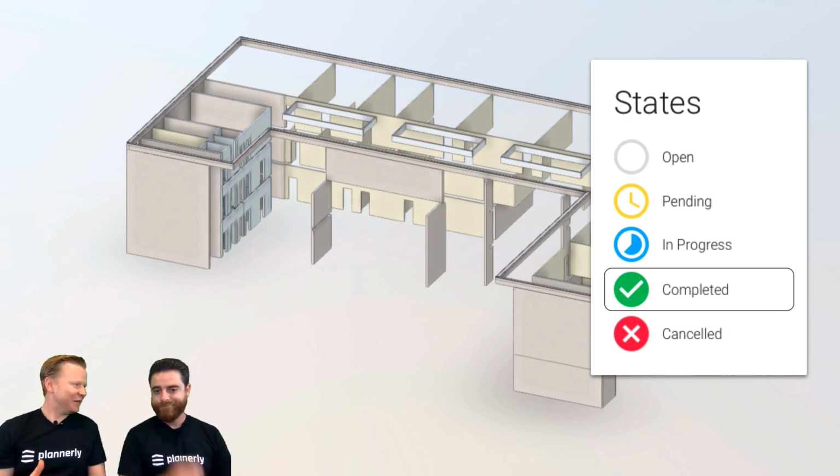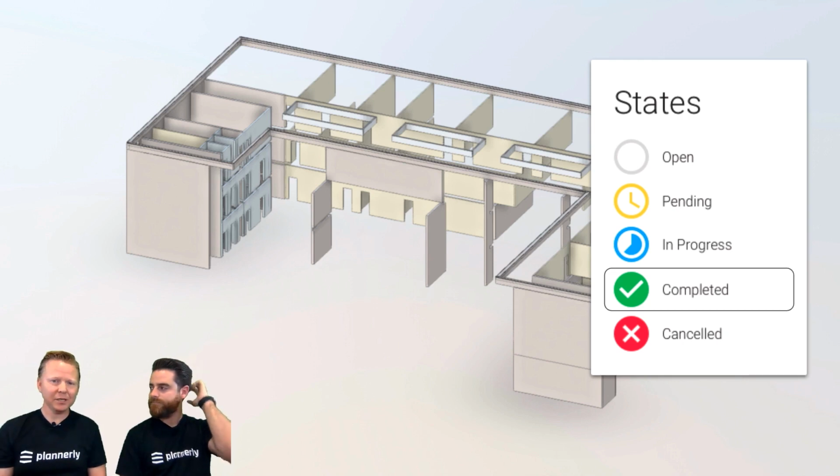I actually suffered this in real life on a BIM project. We were the VDC managers, and unfortunately, a model had been used that was not complete. And the end result was that the quantities were obviously lower, and the budget that was put for that project originally was way lower than it should have been. And that caused some severe impact. So for us, that specific nature of the model and having compliance to make sure that it was complete was really important and continues to be.